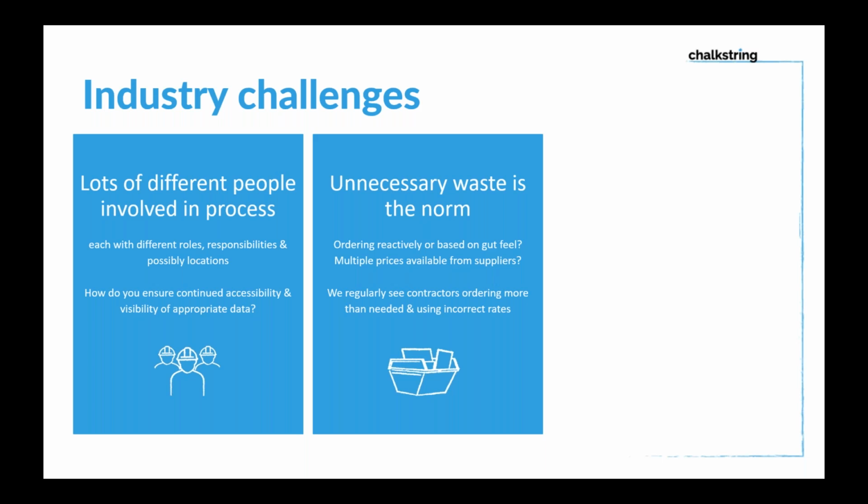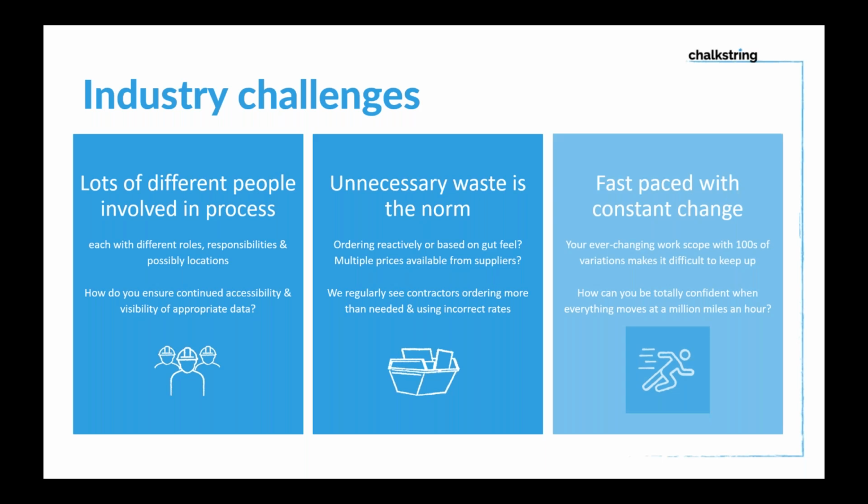And if you've got multiple different suppliers available with multiple supply price lists, project-specific pricing, etc., it's very easy to get in a muddle and use the incorrect pricing and potentially pay over the odds. So wastage really covers both excess quantities and paying too much inadvertently. And that's a problem we see all the time. And of course, that is just lost profit or erosion of your profit.